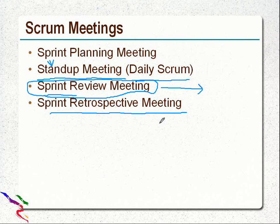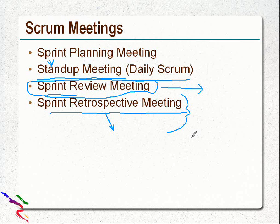The sprint retrospective meeting is basically to understand what went well, what didn't go well, what should be improved, and what are the lessons learned. This is the portion where lessons learned are recorded and productivity hurdles are reported so they do not happen in the next sprint. The basic purpose is to continuously improve the effectiveness of Scrum.